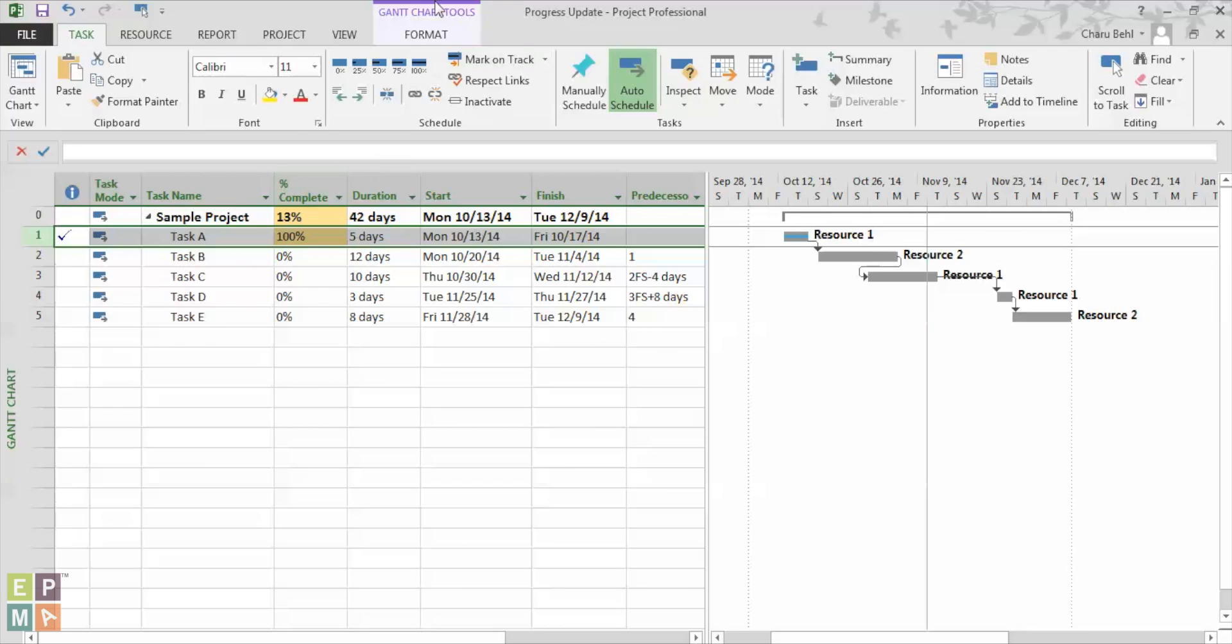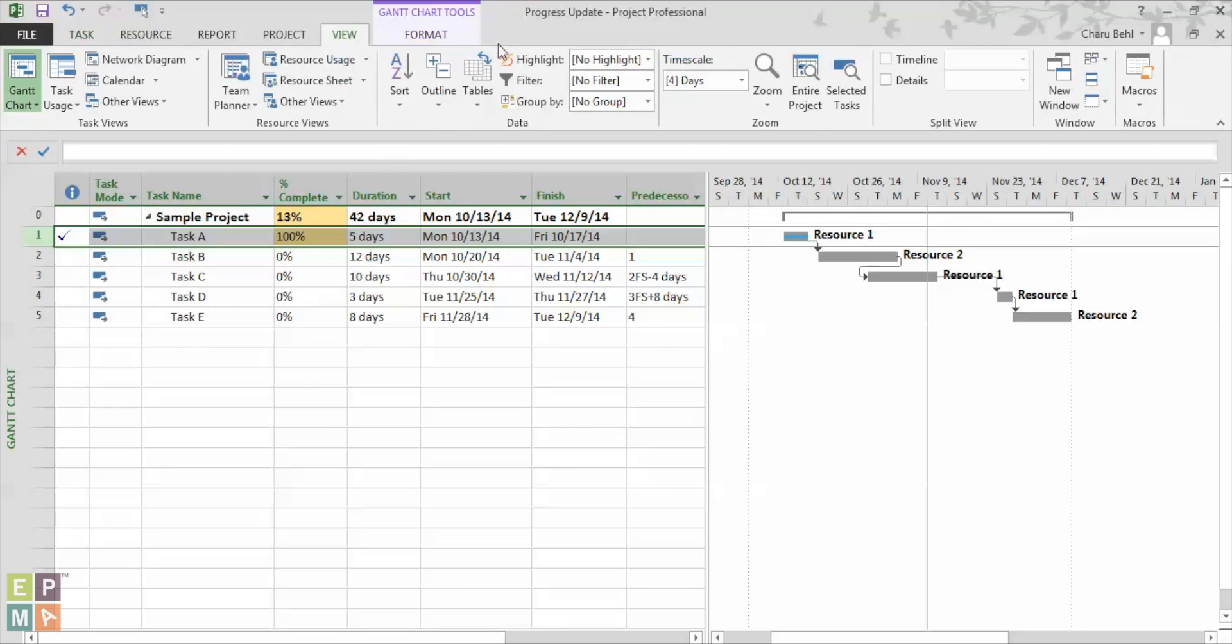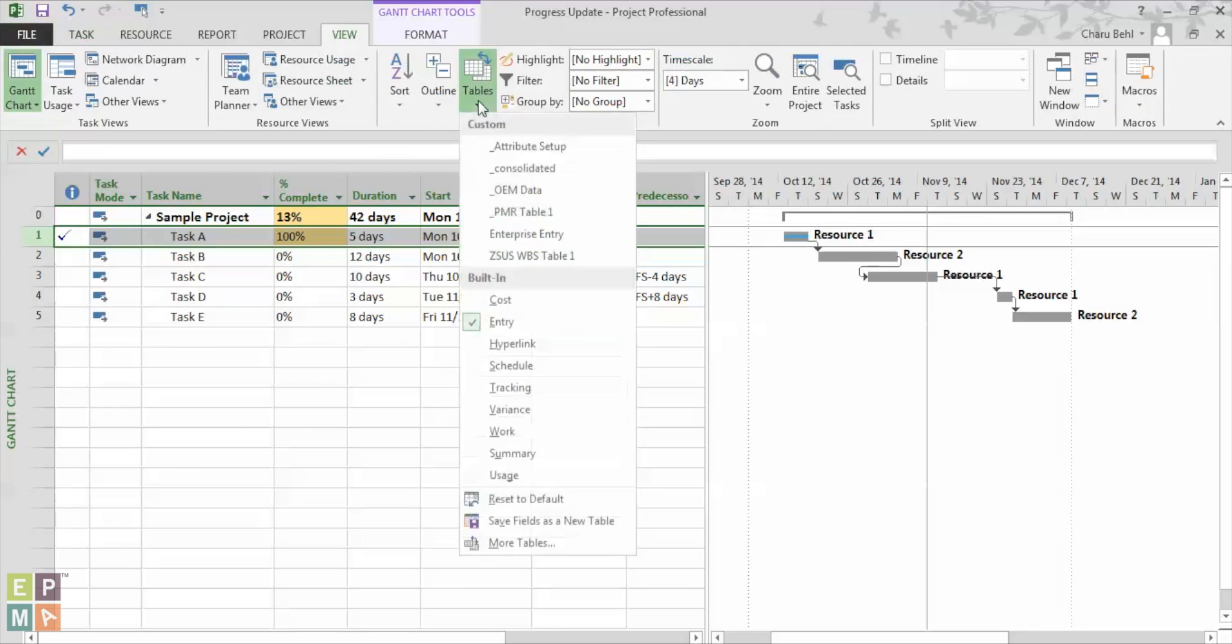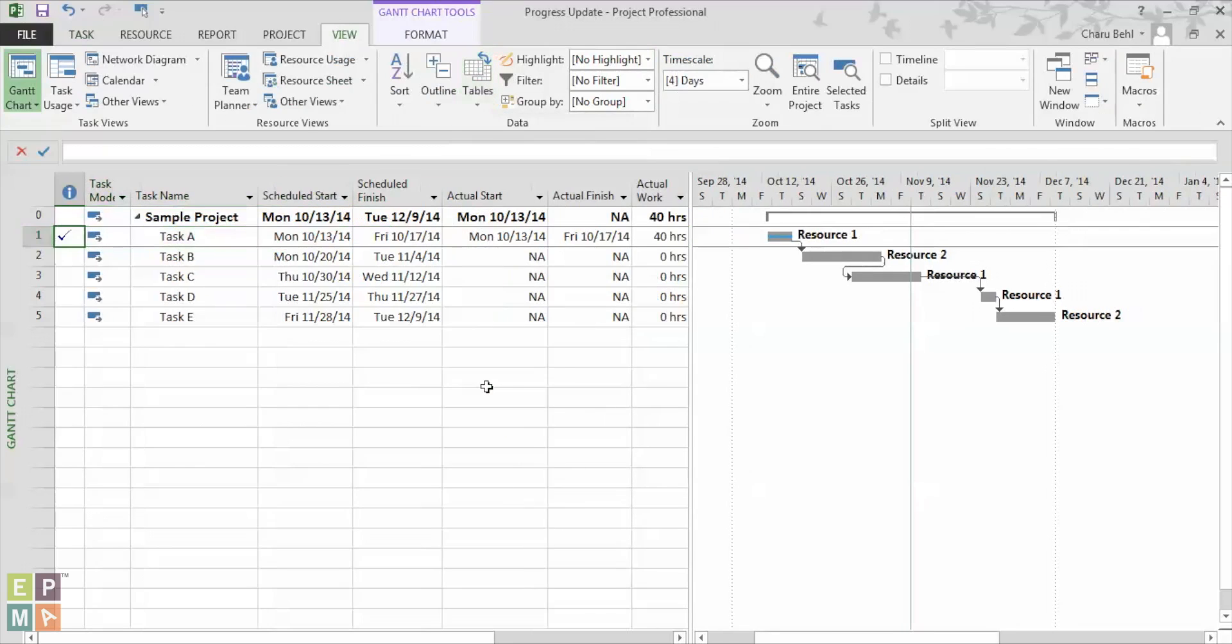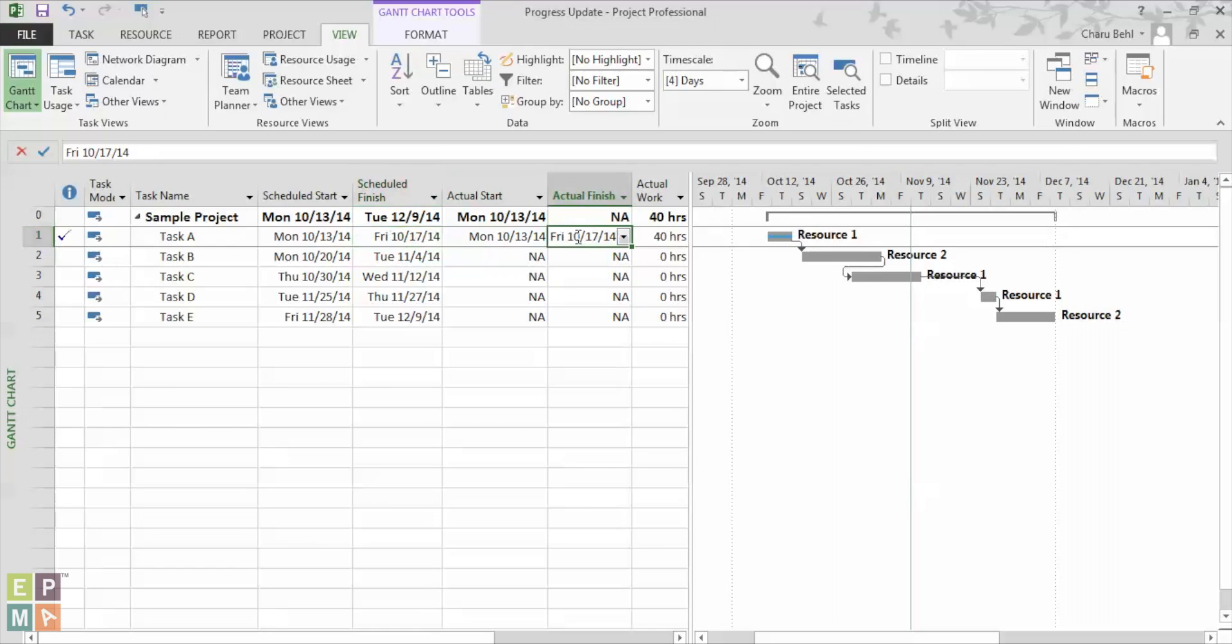And one very interesting thing that you would want to see is that once the task is complete the actual finish date is automatically populated as the schedule finish date.